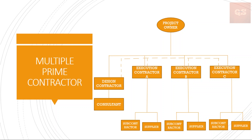Or it can also be organized by project phase — initial works to one contractor, building works to another, parking and basement works to another, and landscape works to yet another contractor. The concept is that project delivery can be sped up by allowing construction to begin prior to completion of the full design. So once initial design is completed, the initial contractor can begin work, and once the building design is completed, the building contractor can start instead of waiting for the entire project design to be finished. This is the main advantage of multiple prime contractors.